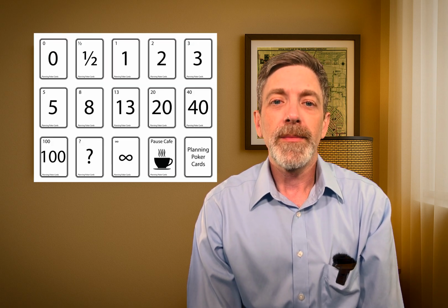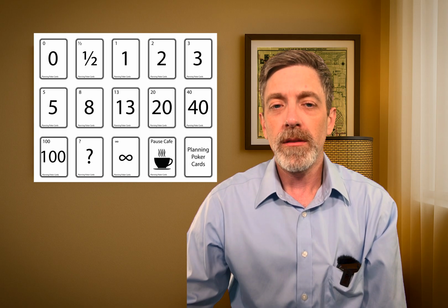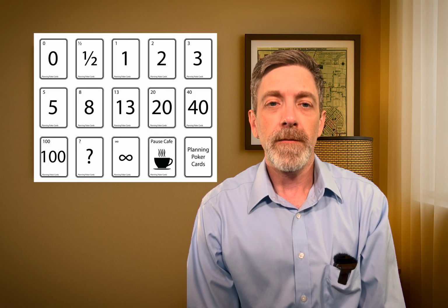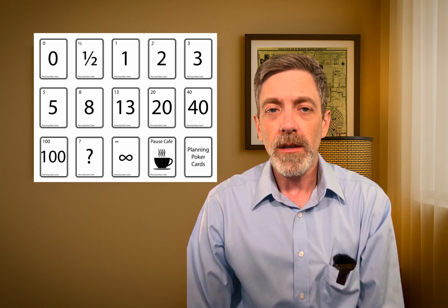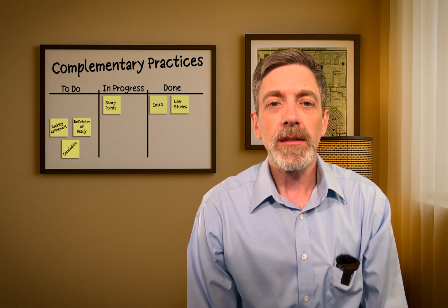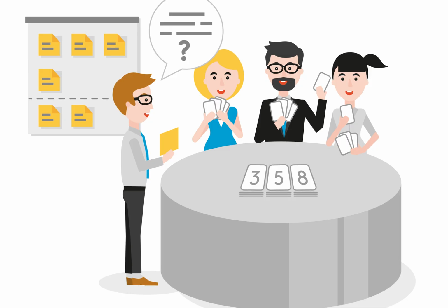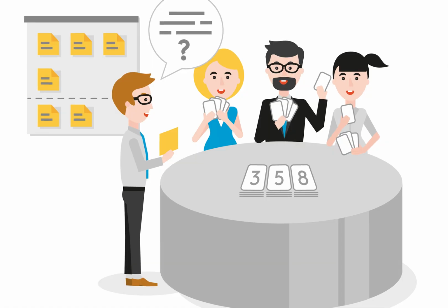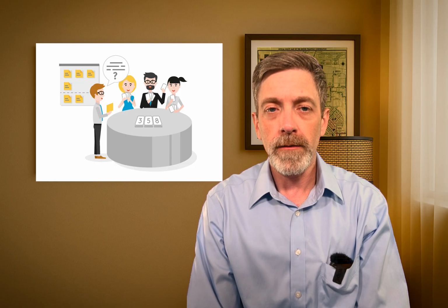In Scrum, it's useful, and it's used because we have this increasing gap in the numbers. We're talking about an increase exponentially in effort. If you're looking at a 5-point story versus an 8-point story, it's not just going to be a little bit more work, it's going to be a lot more work. How much more, that's dependent on your team and your estimates, but the idea is that it's a significant amount. So when we talk about how we get to our estimates and we ensure each team member provides their personal estimate, we want to have that conversation and understand what the work is, but we don't want the senior developer telling every other developer that this is a 2-point story. You can ask questions about the actual work, but don't tell them what you're voting.